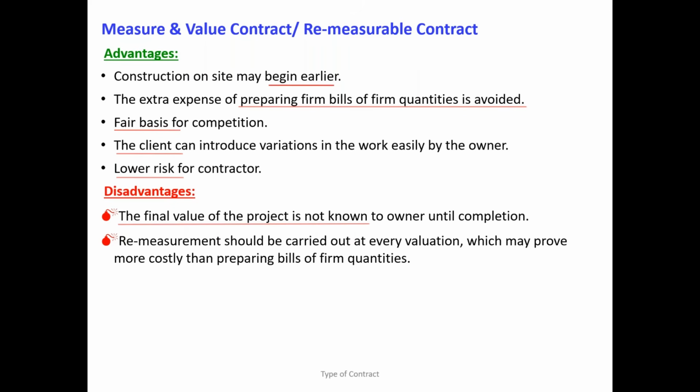Okay. So another thing is, in the lump sum contract, works are not remeasured. Only one time you have to prepare the detailed BOQ. When it comes to the remeasurable contract, every time you have to go to the site, you have to agree all the items. Is it easy or difficult compared to the lump sum contract when it comes to the payment? What do you think? Interim payment application or certification, which is easy, lump sum or remeasure? A remeasure is difficult, isn't it, compared to the lump sum?